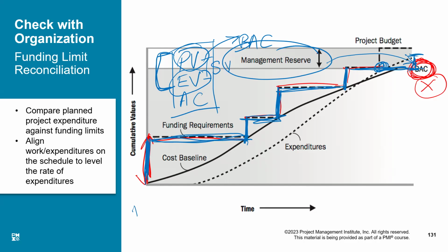I am behind in schedule by this much time. And if you compare earned value with the actual cost, that will represent your cost variance. So this is an interesting mechanism in which in a single diagram, you can see the performance as far as schedule variance is concerned and the cost variance is concerned. Right? So far, so good?